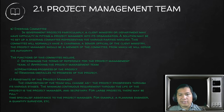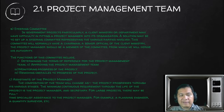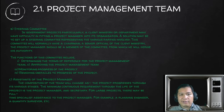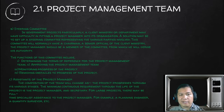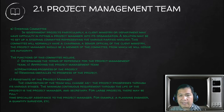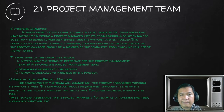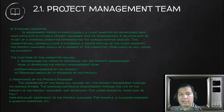We also have the steering committee. In government projects particularly, a client ministry or department may have difficulty fitting a project manager into its organization. A solution is to set up a steering committee representing the various parties involved. This committee will normally have a chairman — a senior official of the client or ministry. The project manager should be a member of the committee from which he derives his authority. The functions of the committee include determining the terms of reference for the project management team, approving the project management team, monitoring progress, and removing obstacles to the progress of the project.